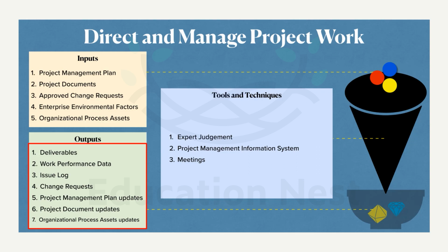Issue log. So this is something different. We all know what an issue is. We learned how it is different from a risk, the differences between a risk and an issue. So this log will have all those current problems, but in a systematic way. The document format is also not important because every organization has its own format, but it should have all the important information in it. Like when I say important information, it could be the type of the issue, who is responsible to solve the issue, the target date of the resolution, or some information on the planned actions also, right? All this comes under this issue log.